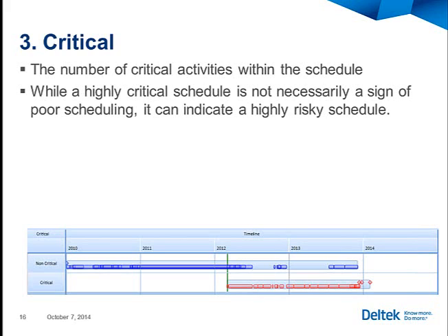When we see schedules that have more critical activities, you're indicating that the schedule has a higher risk. If there's 10 things that I need to do to get the project done on time, and any one of those could slip my plan immediately when it starts slipping, that's a highly critical schedule. If my project has 10 things to do, but only 3 of them will really push out the end date, that's not so bad. That means as resources are constrained or if there's problems with the other 7 activities, I still might be able to deliver on time.